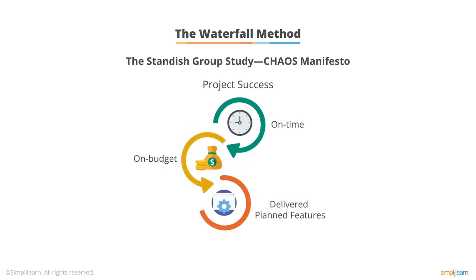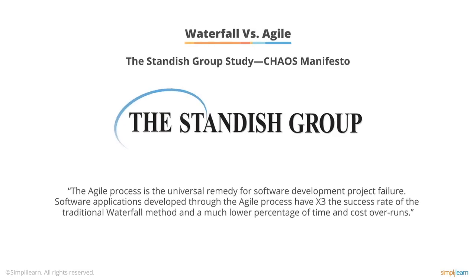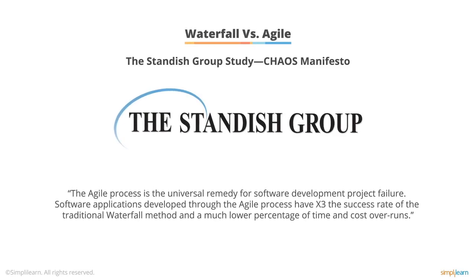The study summarized as follows: the Agile process is the universal remedy for software development project failure. Software applications developed through the Agile process have three times the success rate of the traditional waterfall method and a much lower percentage of time and cost overruns.